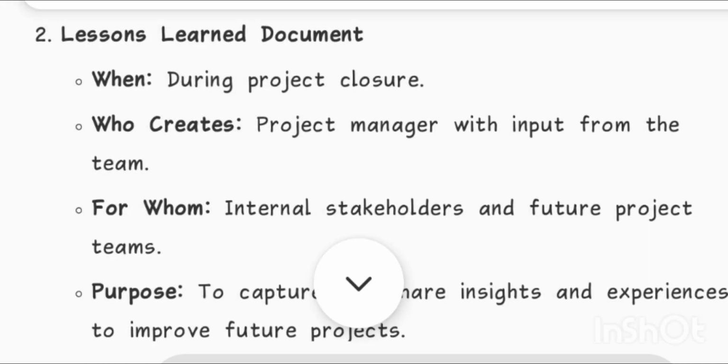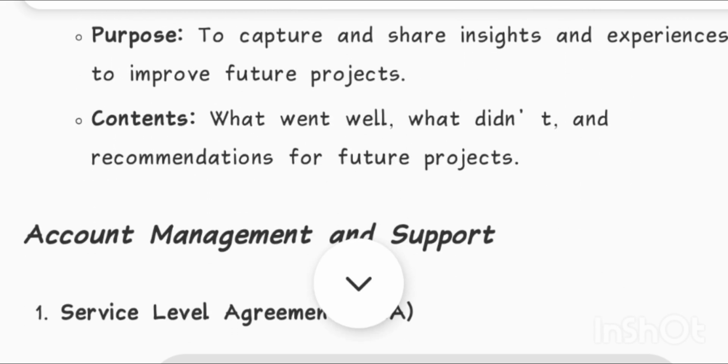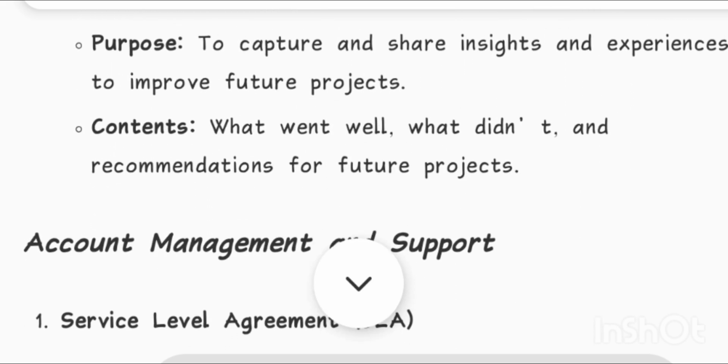2. Lessons learned document. When? During project closure. Who creates? Project manager with input from the team. For whom? Internal stakeholders and future project teams. Purpose: to capture and share insights and experiences to improve future projects. Contents: what went well, what didn't, and recommendations for future projects.